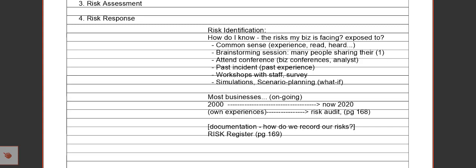And normally the risk auditor will also take the old or the existing risk register to run through. And as the risk auditor runs through the existing risk registers, the risk auditor will consider if these risk registers have to be updated.